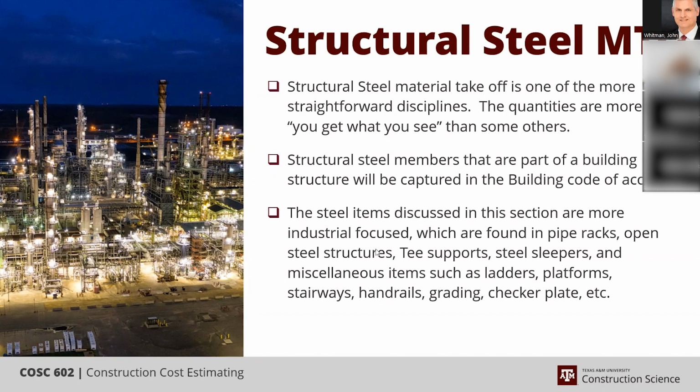If it were a full regular job, we would look at how many we were going to pour, because if we just had 2 or 3, you'd have a short load fee. On the other hand, even though they're small, if you had 10 of them, you'd use up a whole truckload anyway. But the other aspect is maybe you have 100 of them,